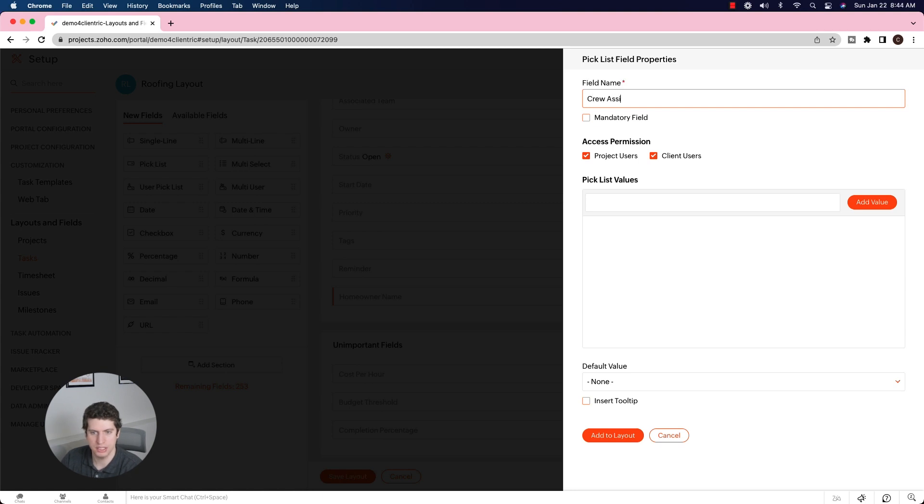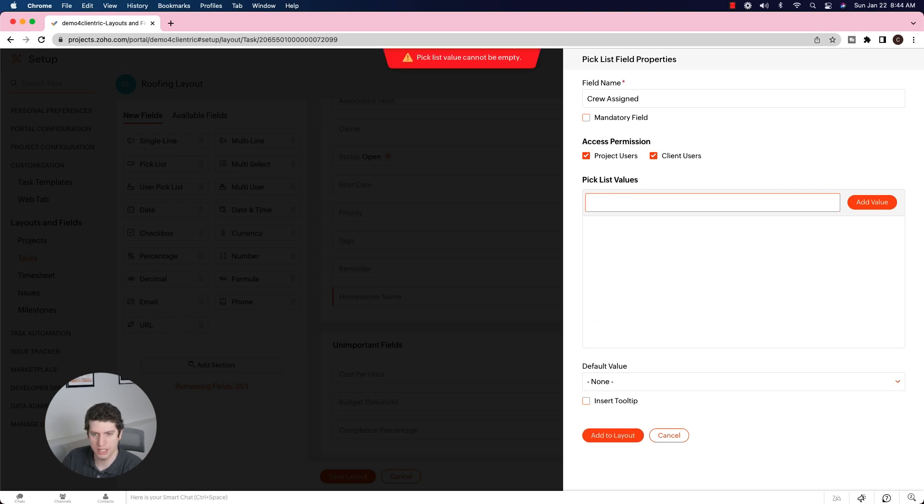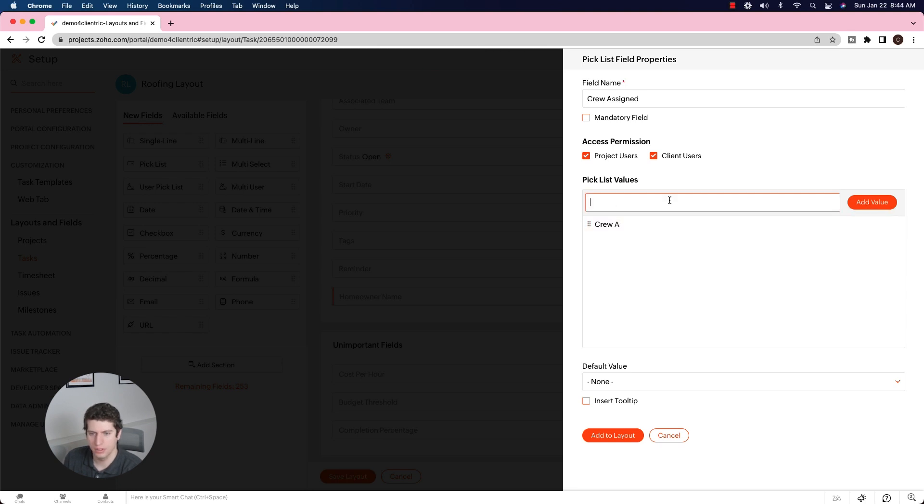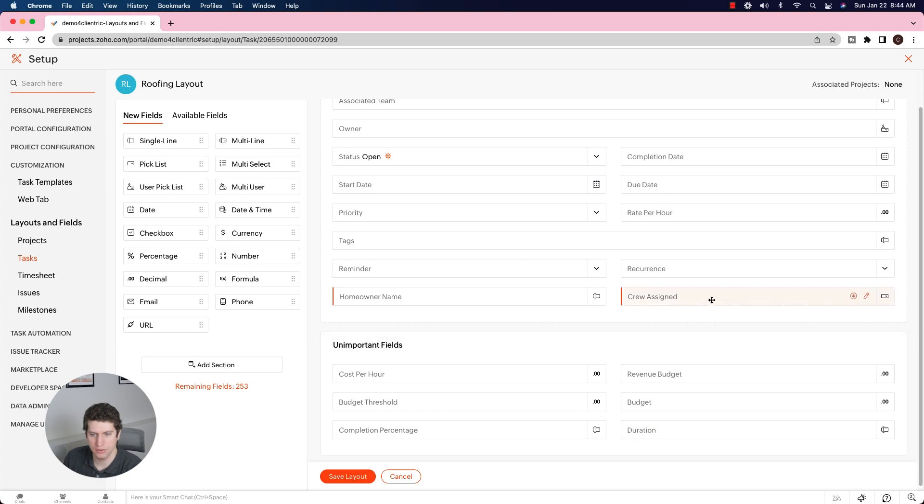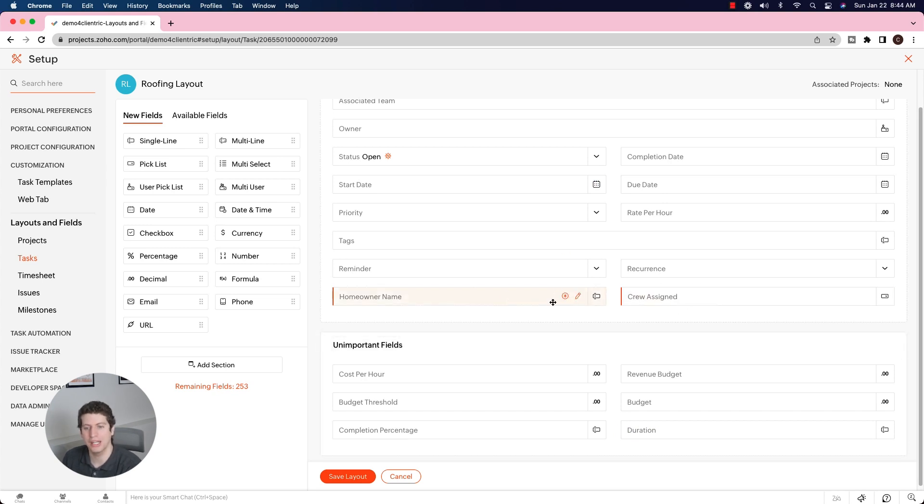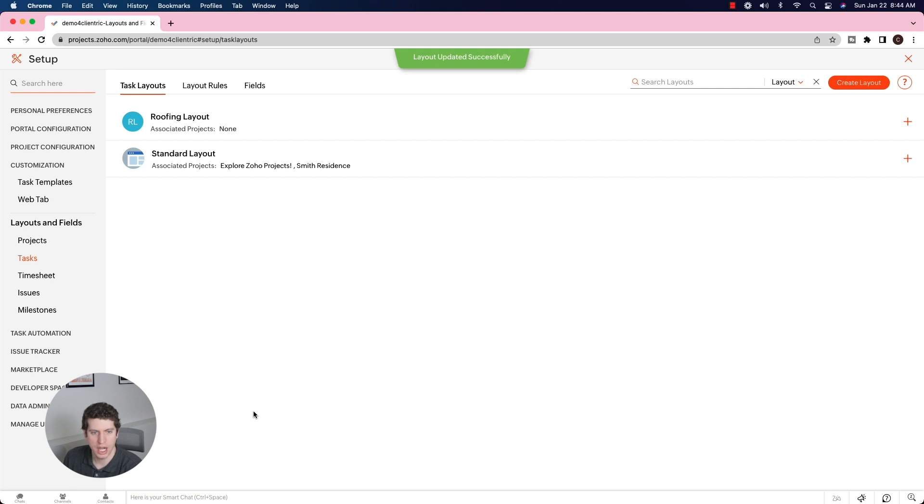So we're going to say crew assigned, and we're going to add picklist values. I'm going to say crew A, add value. Crew B, add that value. Crew C - so maybe you have a bunch of different crews that you want to assign to a specific project. We're going to add that to the layout. So crew assigned is now going to be a field. Anytime we create a new task, you're going to see the homeowner name and the crew assigned. I'm going to save this layout.